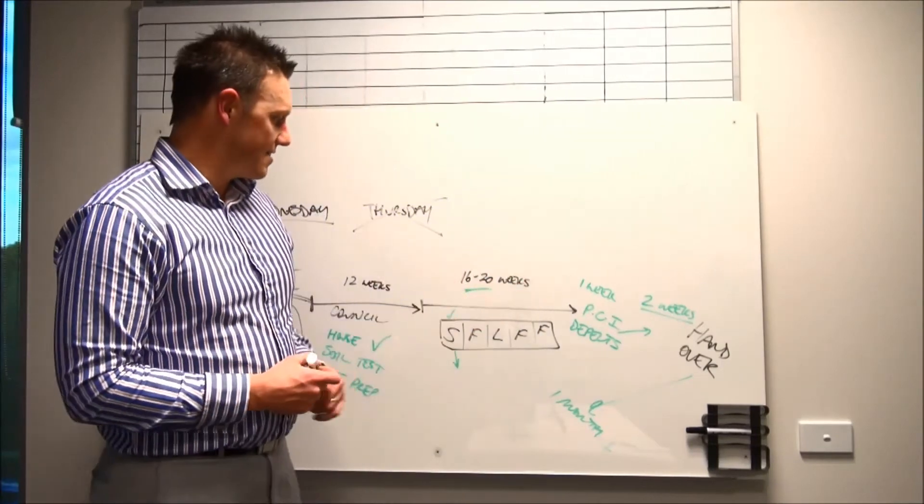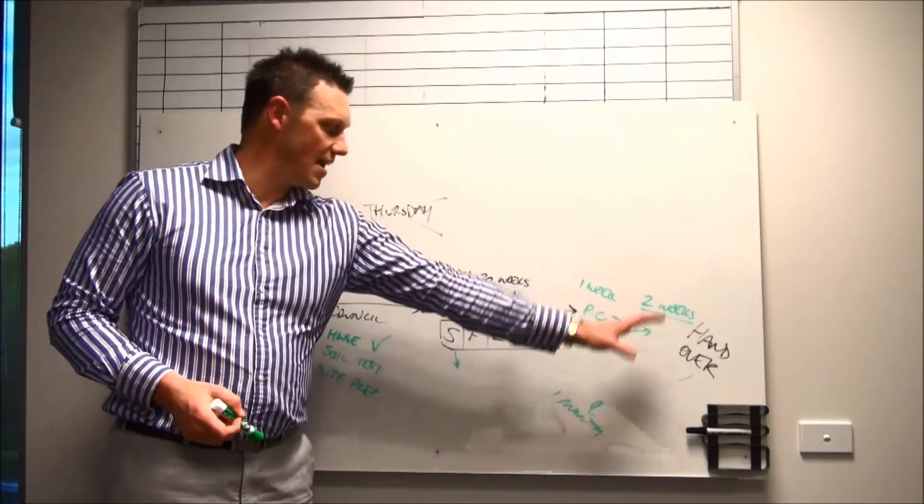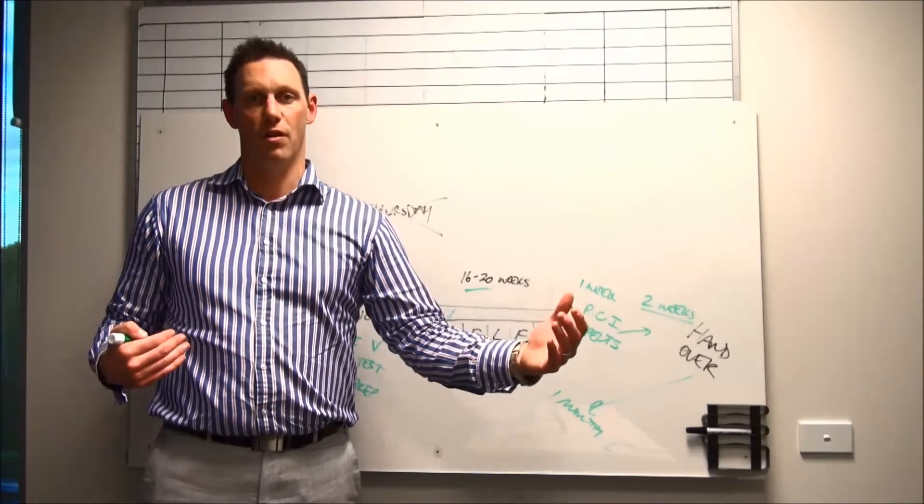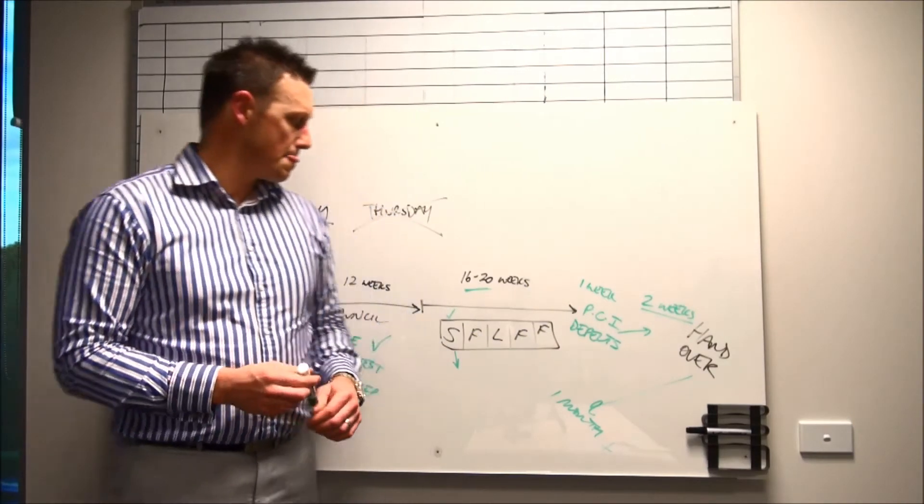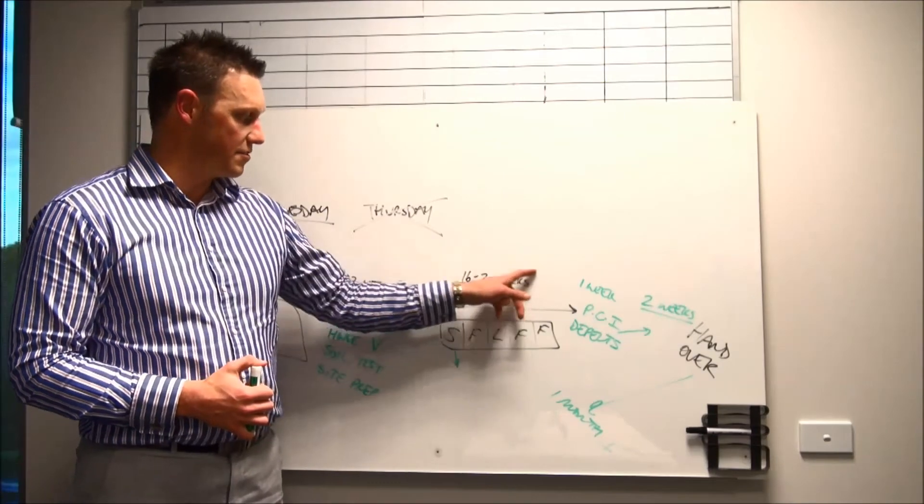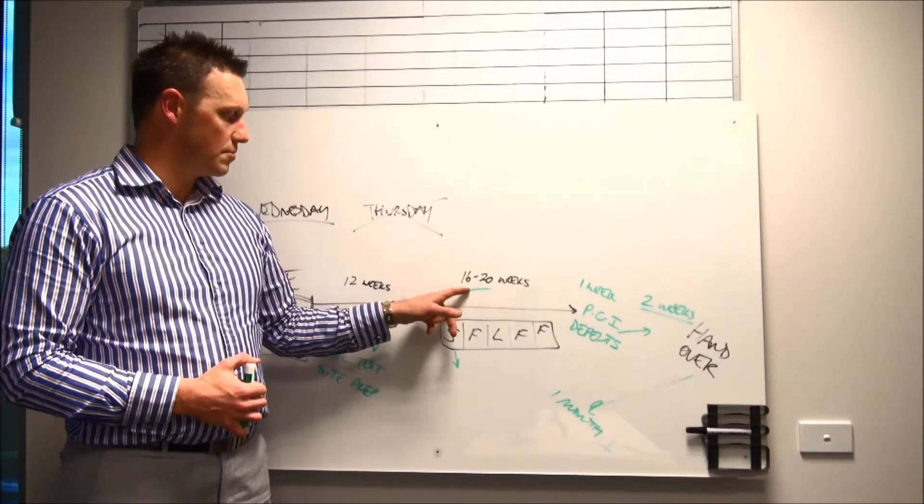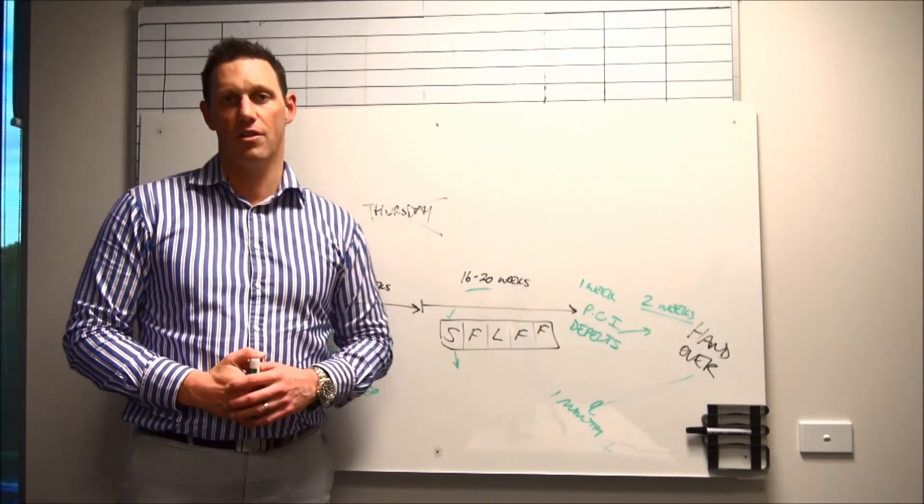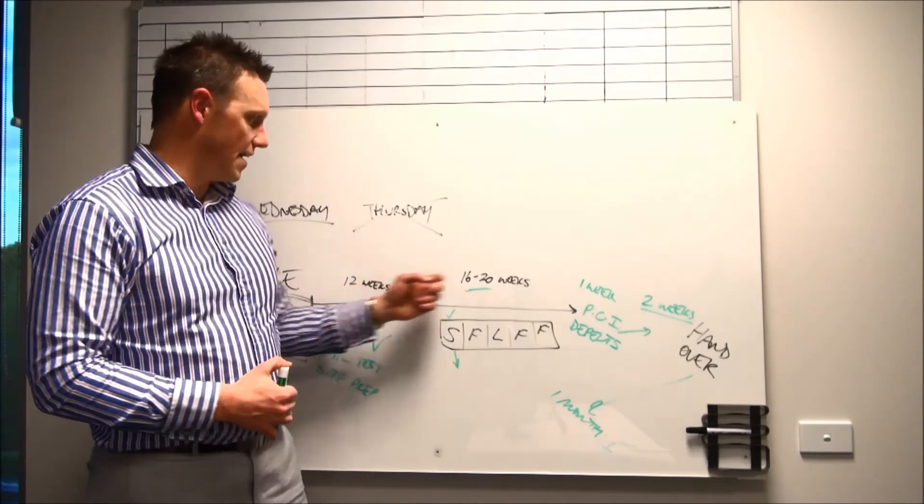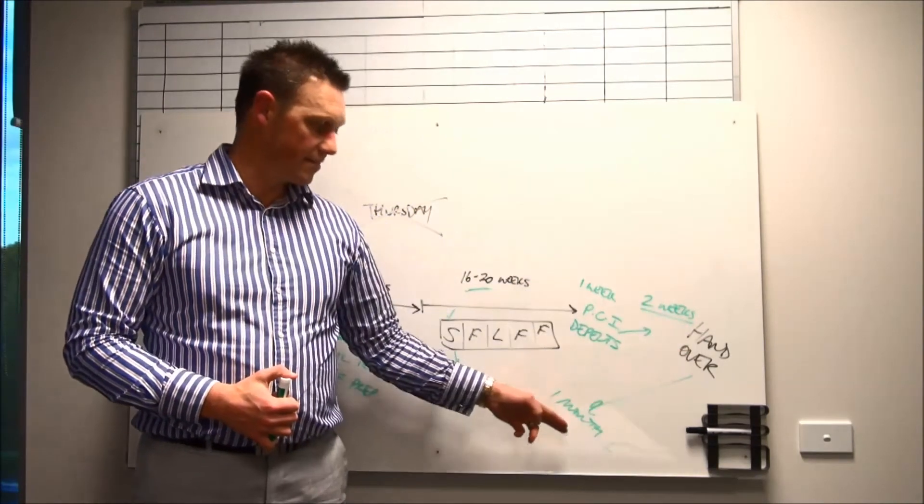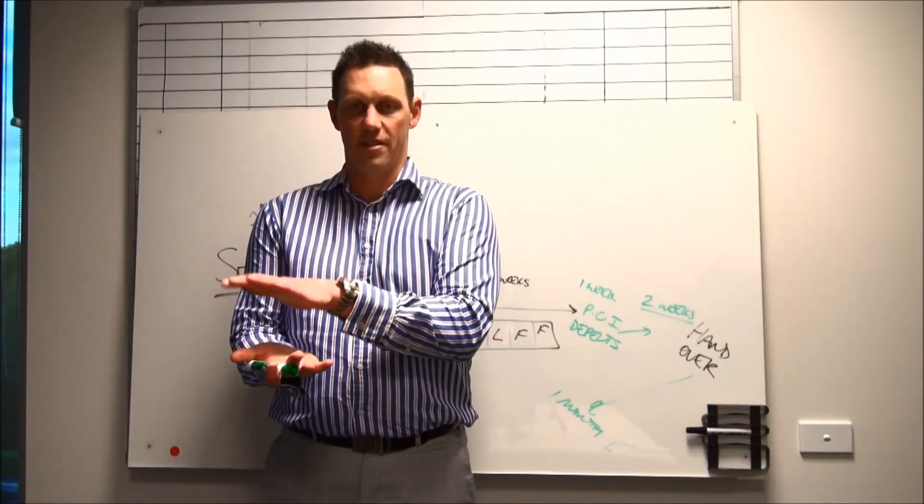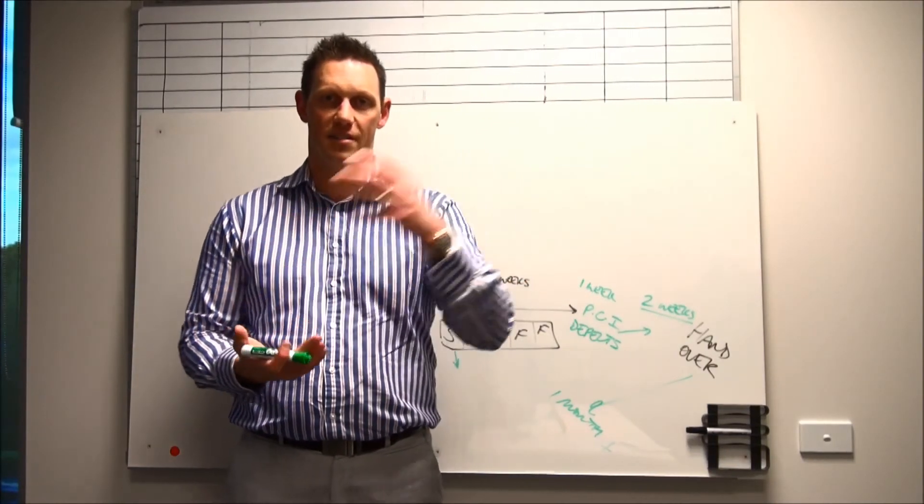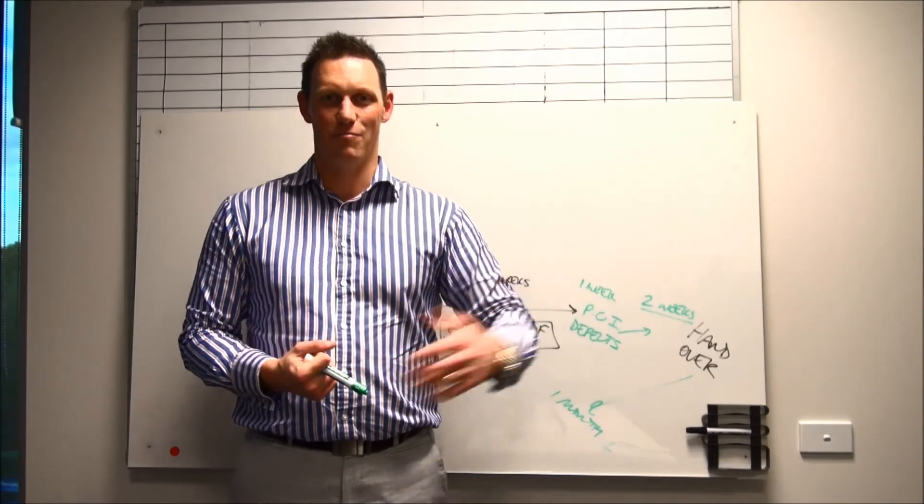So I guess in summary, guys, there is a rundown of all the things that happen through a build process. If you are building or you're thinking about building, please, the takeaway message from this WOD is that while the builder might guarantee a certain build time, make sure you factor in all the other weeks, months that go into this process between when you settle on a block of land and start paying interest and you actually start to get rental income from your property.